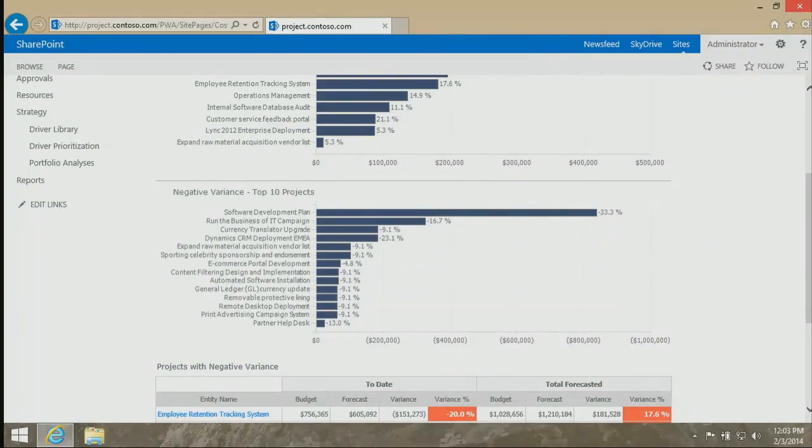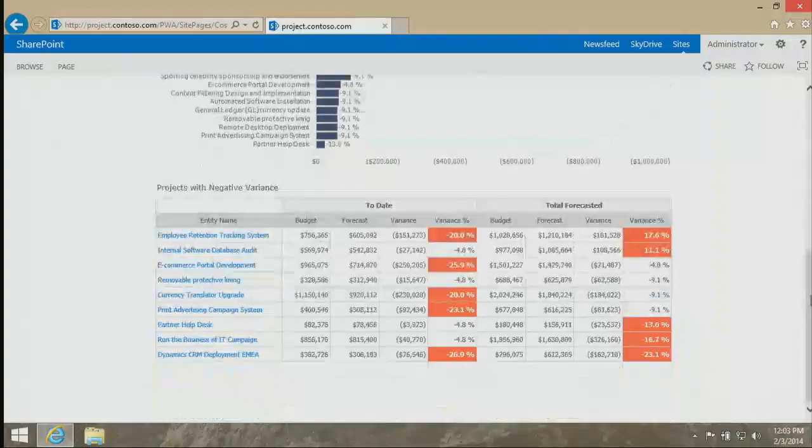Makes sense? The next bucket here I kind of think of as the sheep in wolf's clothing, to a degree. These are the ones that are currently trending under budget, but the project manager is aggressively reforecasting that they're going to get back on budget, right? And you're going to keep watching those because over time, if they continue to aggressively forecast, you're going to have to say, look, I'm sorry, I don't believe you anymore, and you maybe aggressively take money back from them. Because what we tend to see in this situation causes a Q4 concern from a budget utilization perspective, meaning that suddenly in Q4 you've got a massive budget utilization problem.